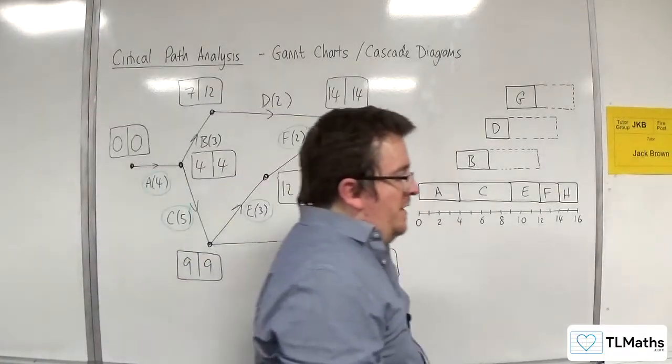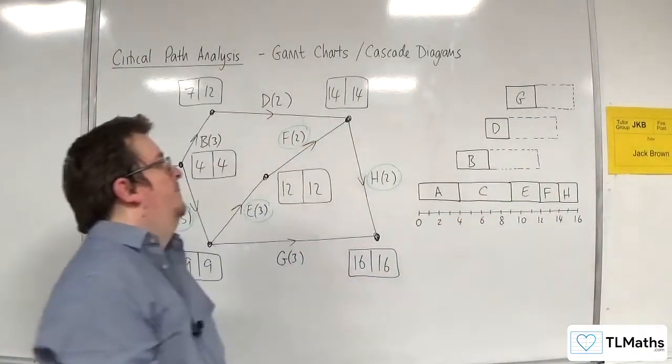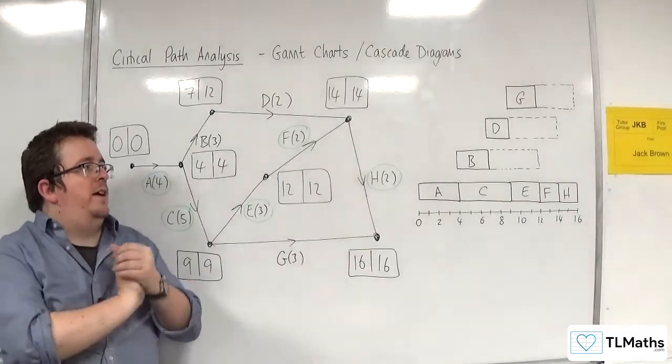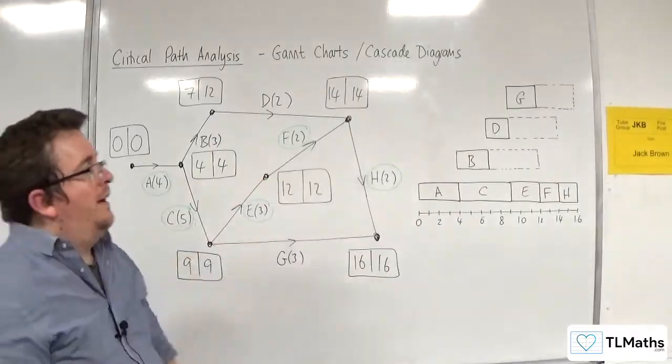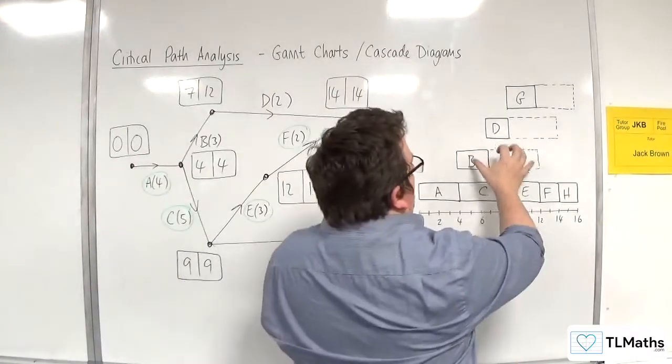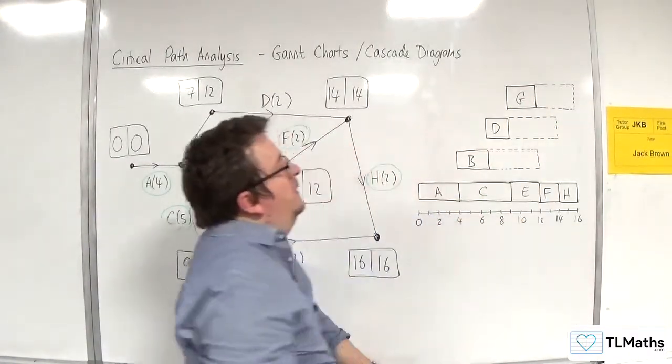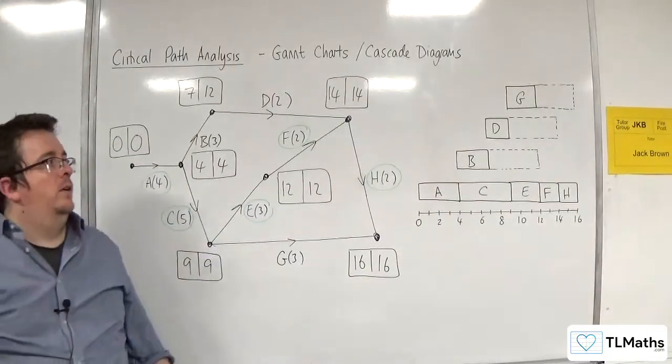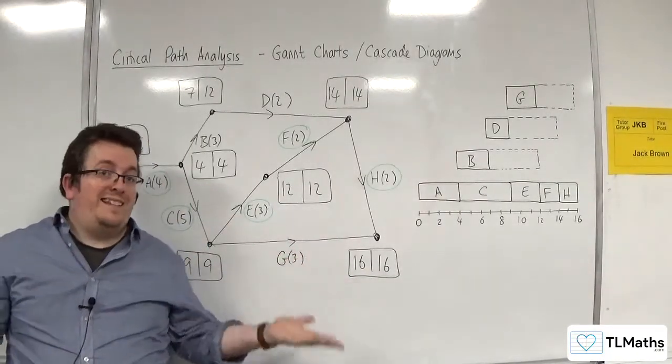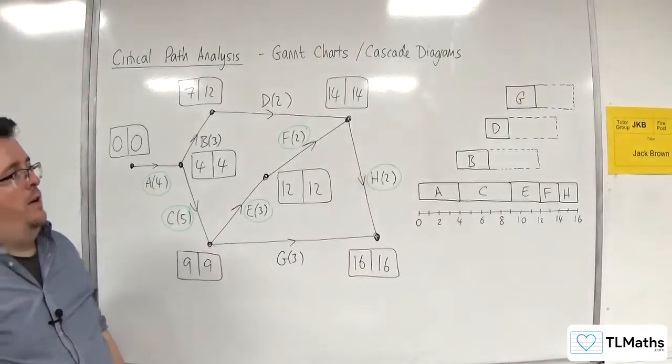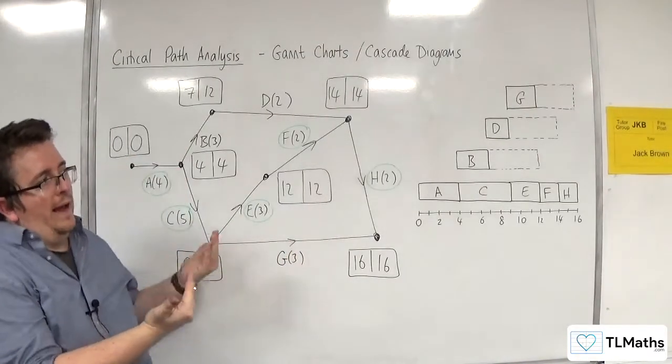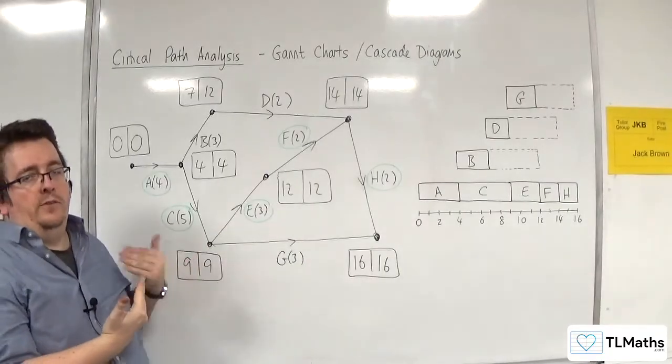And so that is your Gantt chart. What it does is all of your critical paths at the bottom, and then all the other non-critical activities one on top of the other, preferably in the order that they appear, but not necessarily.